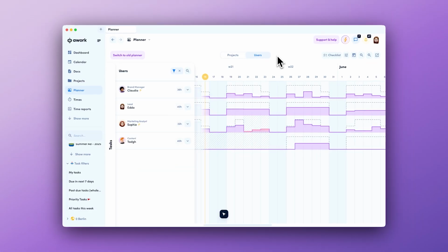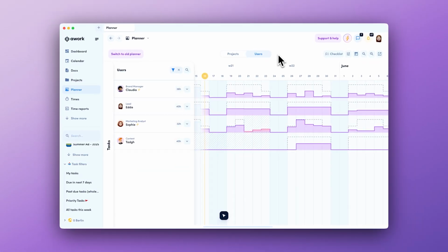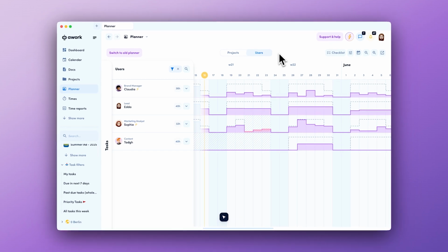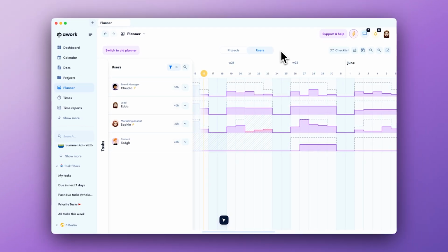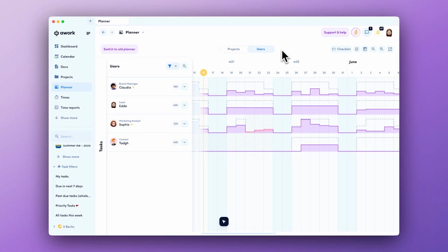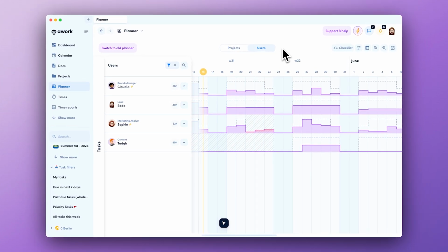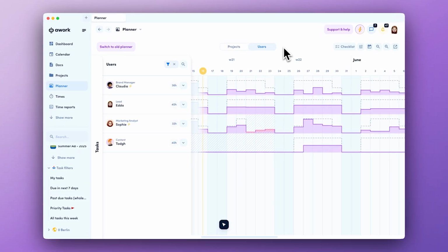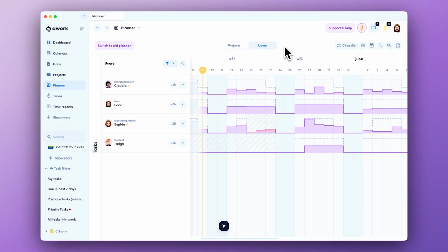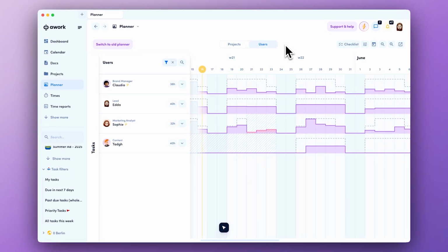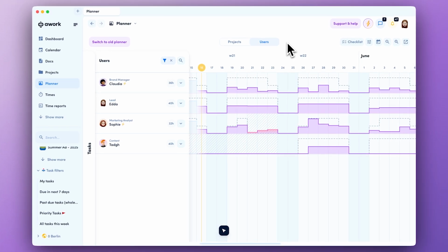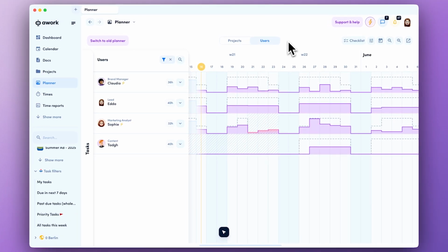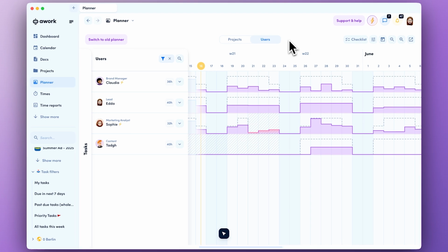For this workflow, you'll need tasks with one or more assignees, a budget, as well as a start and an end date. You should either track time on tasks or schedule them in the calendar. These times are then deducted from the task's workload, ensuring it's always up to date. Define a planning period. For example, you plan the upcoming week every Thursday morning during a planning meeting. That way, you'll have a clear overview of your team's capacity for the following week right after the meeting.